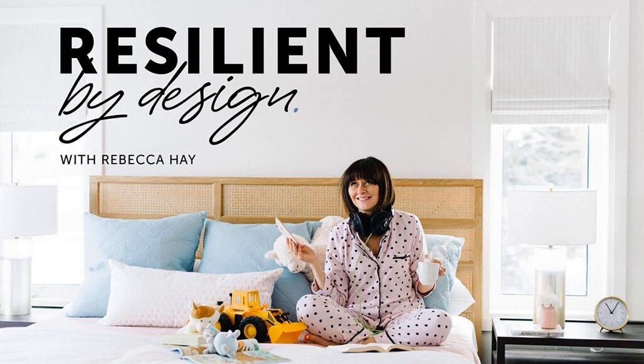Whatever it is that you're ordering for a project, whether it be lighting, maybe it's cabinetry, maybe it's tile, maybe it's flooring, plumbing, hardware, drapery fabric, whatever, we tell our clients, and this is outlined in our process, that we will place all of the orders, and only once we've started to place the orders and we get a sense of lead time, will we then schedule our kickoff on site. And kickoff isn't even demo. Kickoff is we meet on site with the contractor, we review everything, make sure we're all on the same page, that scope hasn't changed or what have you, and we schedule demo.